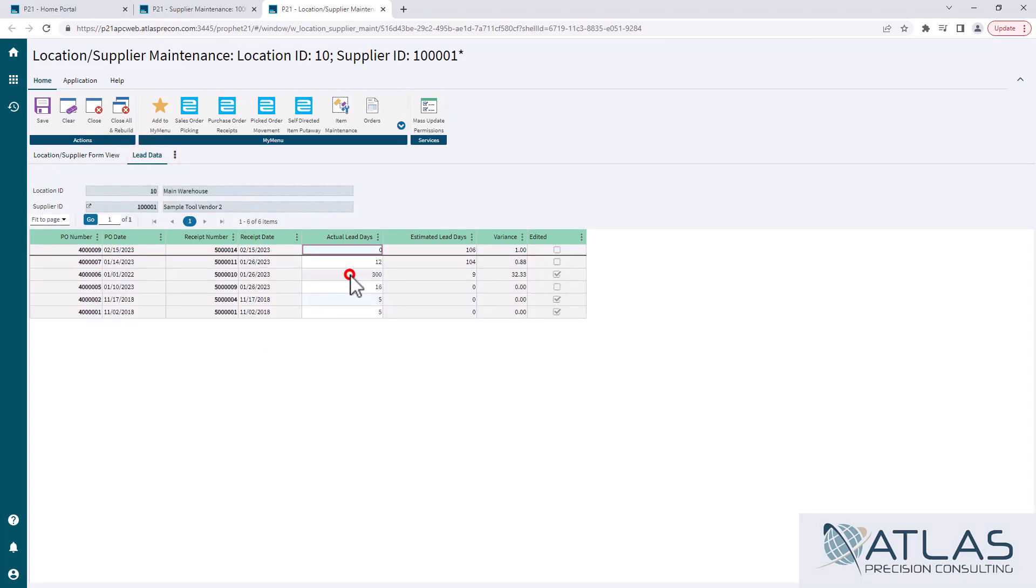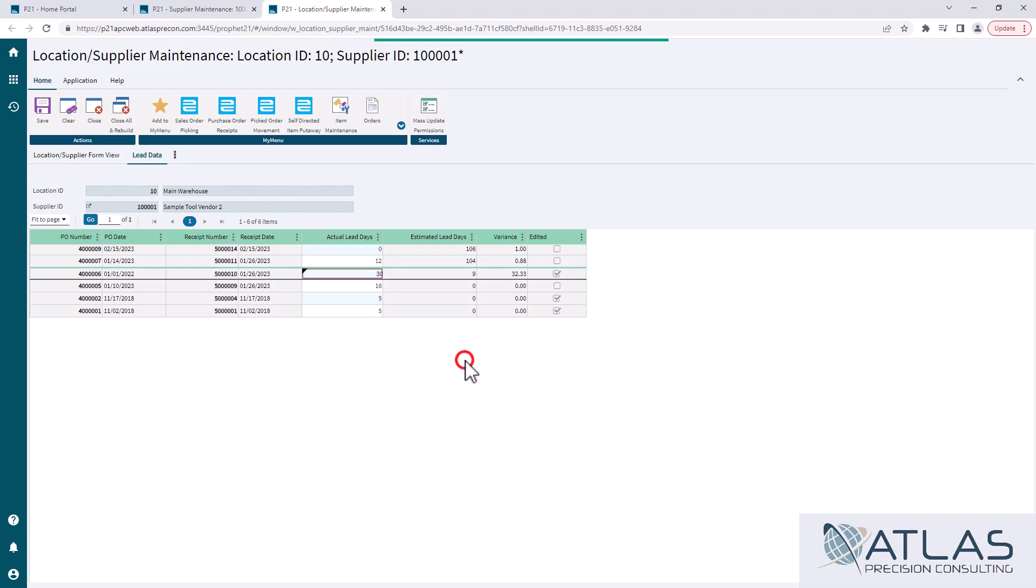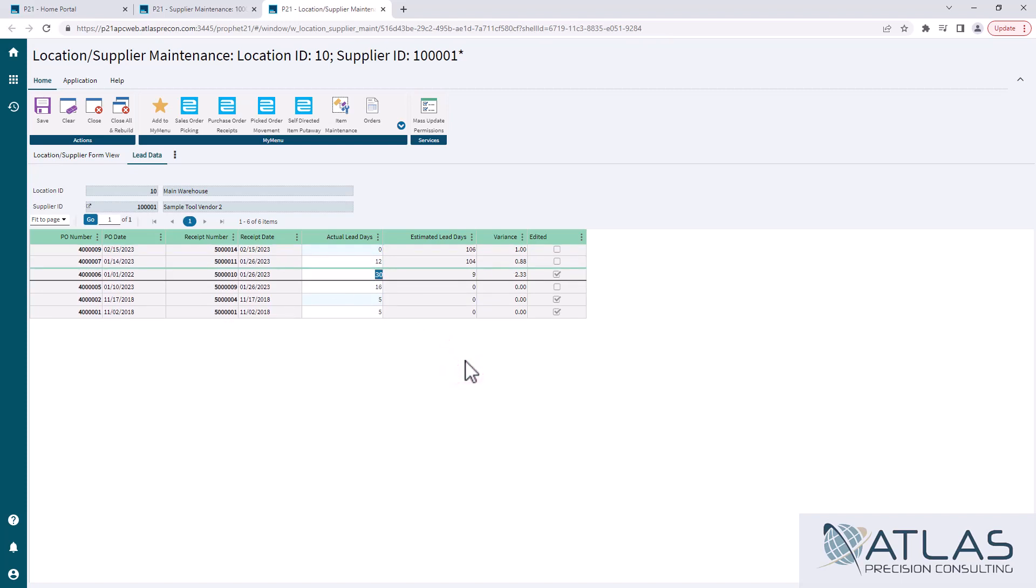But if you are using your lead time source as supplier, this is where you can update that average lead time. So you can come in here and say, oh, that should have been 30 days. That are 300 days. It should have been 30 days. And you hit save. Now, the issue with that is it's not going to recalculate the average lead time until your next receipt.